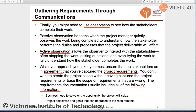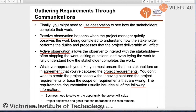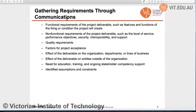These observations need to be captured in an agreement to record the actual project requirements. For project requirement documentation, the information that needs to be included is: the business need or opportunity of the project, project objectives and goals, functional and non-functional requirements, quality requirements, the effect of deliverables on entities or the organization, and any assumptions.